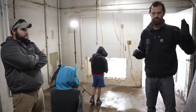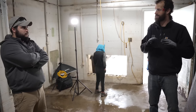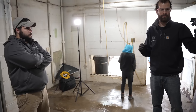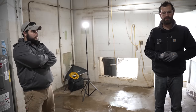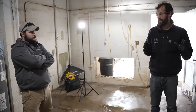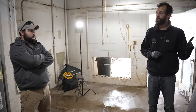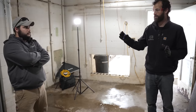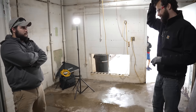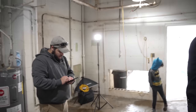What does regular business hours look like? Are we coming in on a Saturday and doing a start to finish swap of equipment? What's the layout of the new equipment? What are the power needs? I think we'll be able to get a good synthesized big picture. And then again, can we open with this equipment and then cut over a couple of months in so we're not delaying the whole project? What's the projected finish time for this as it stands now? Take your time, I'll keep poking around.